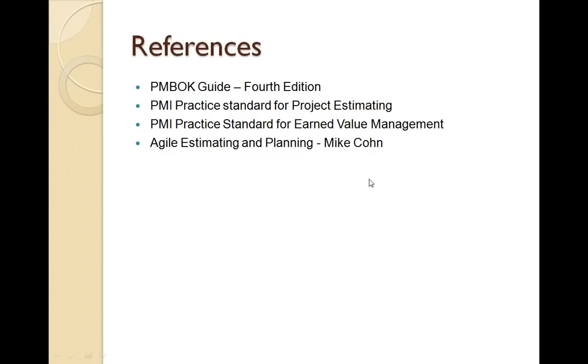Okay, the next question is how the capacity, available hours, and project estimation are linked. Is it top-down or bottom-up? So I'll give you an example of how the estimation is practically done in an Agile environment. We start with story points, which we can relate to a top-down approach, wherein we say that this particular requirement is a story point of 13. So that's a very high-level sizing that we have done for that particular requirement.